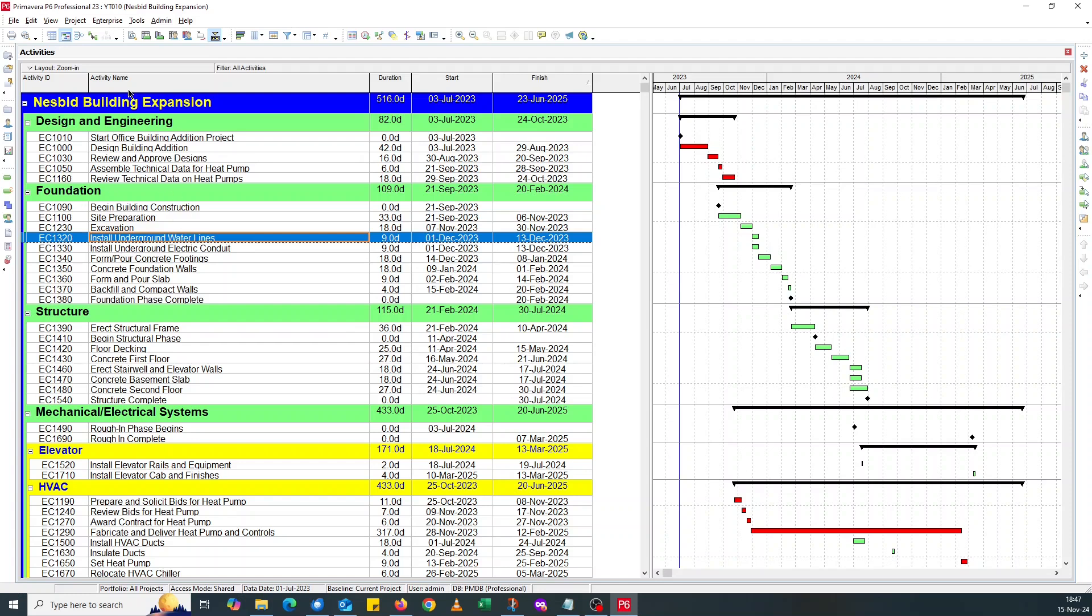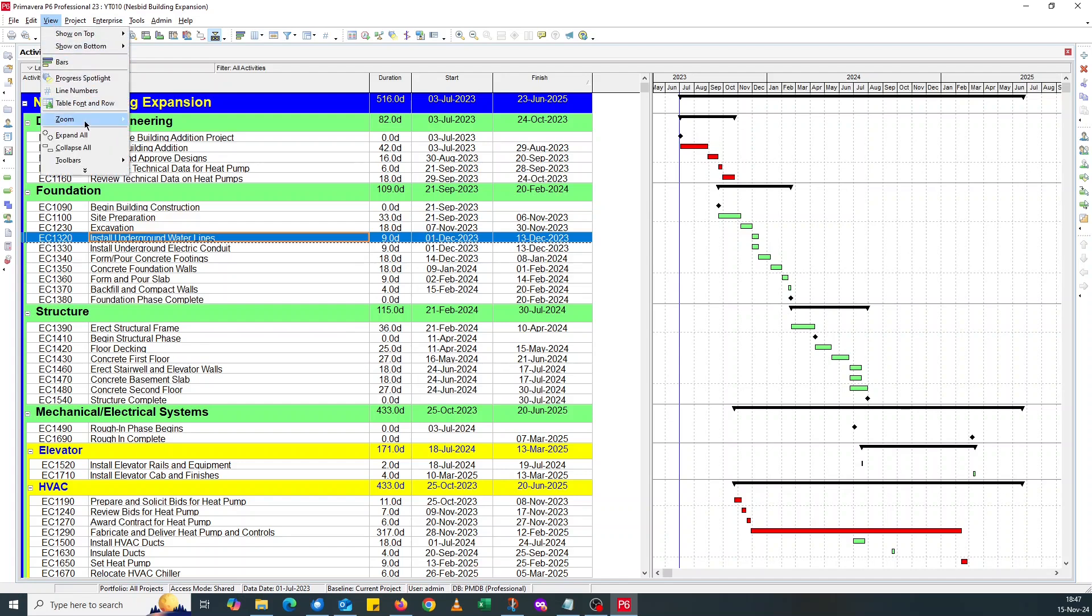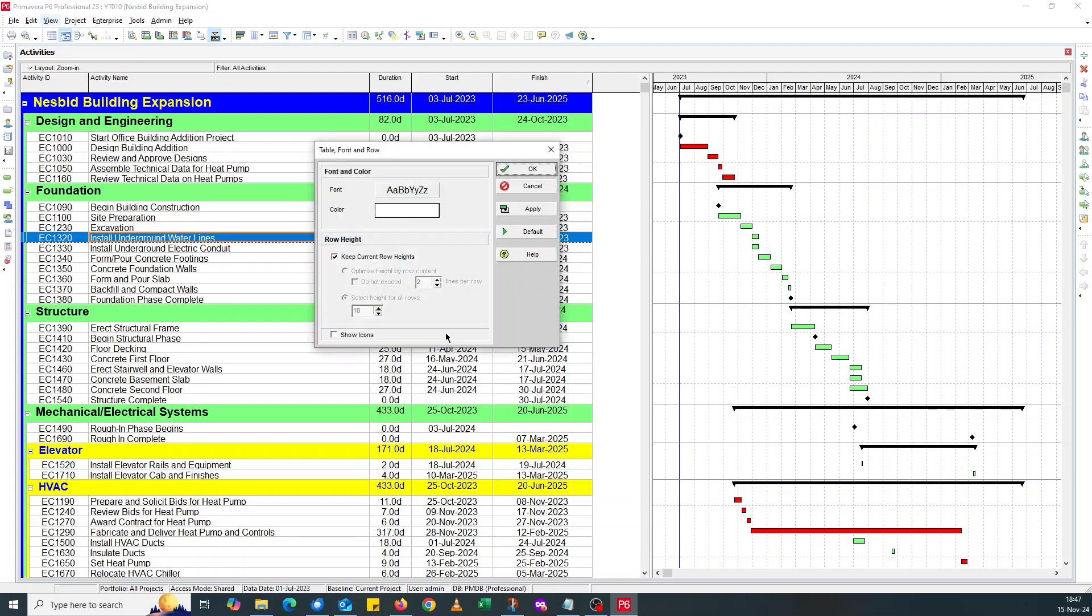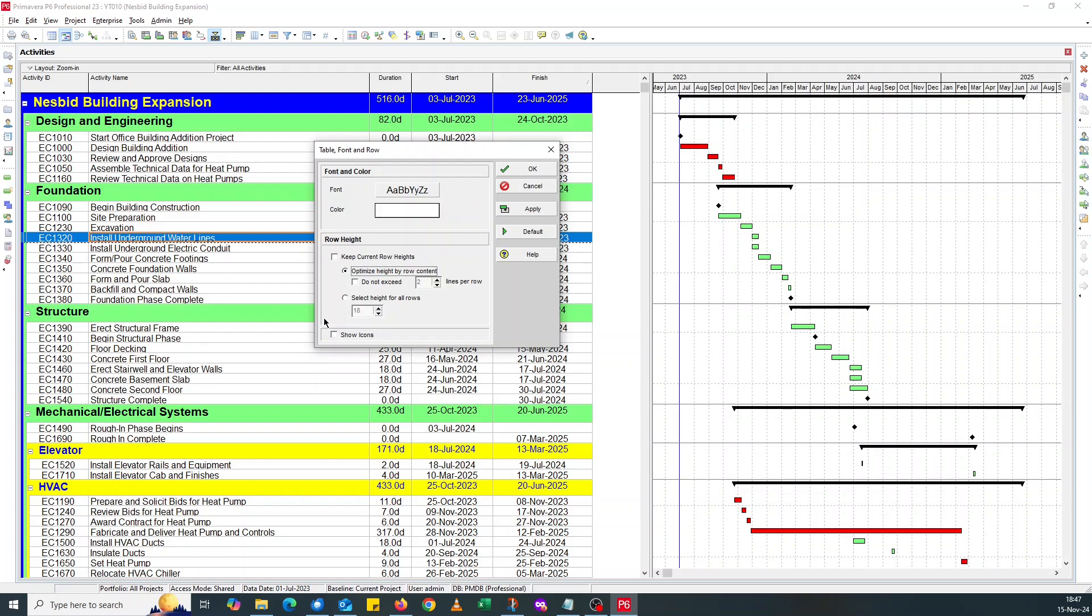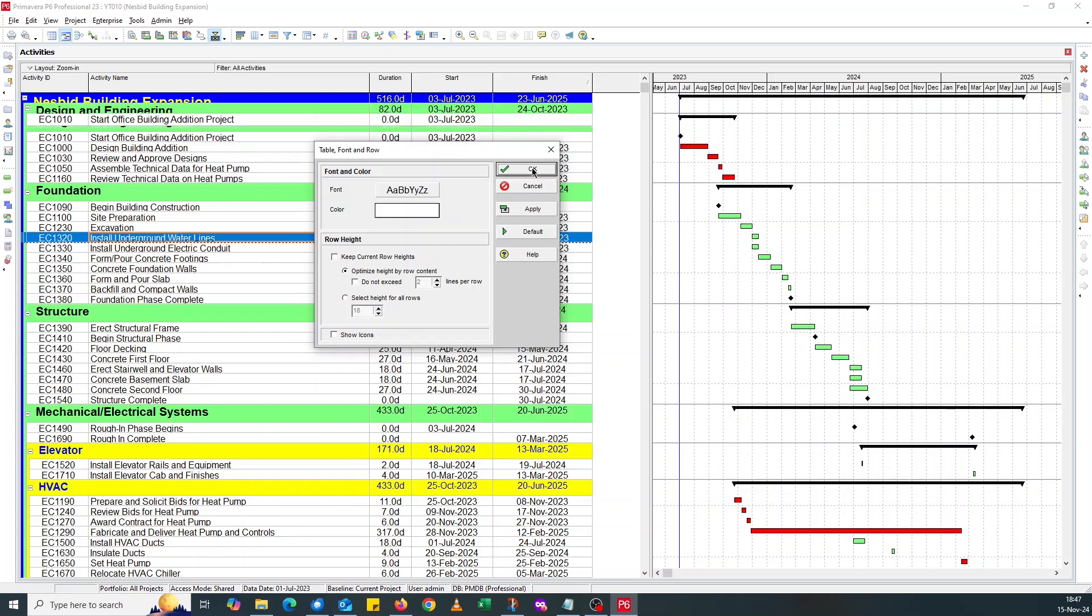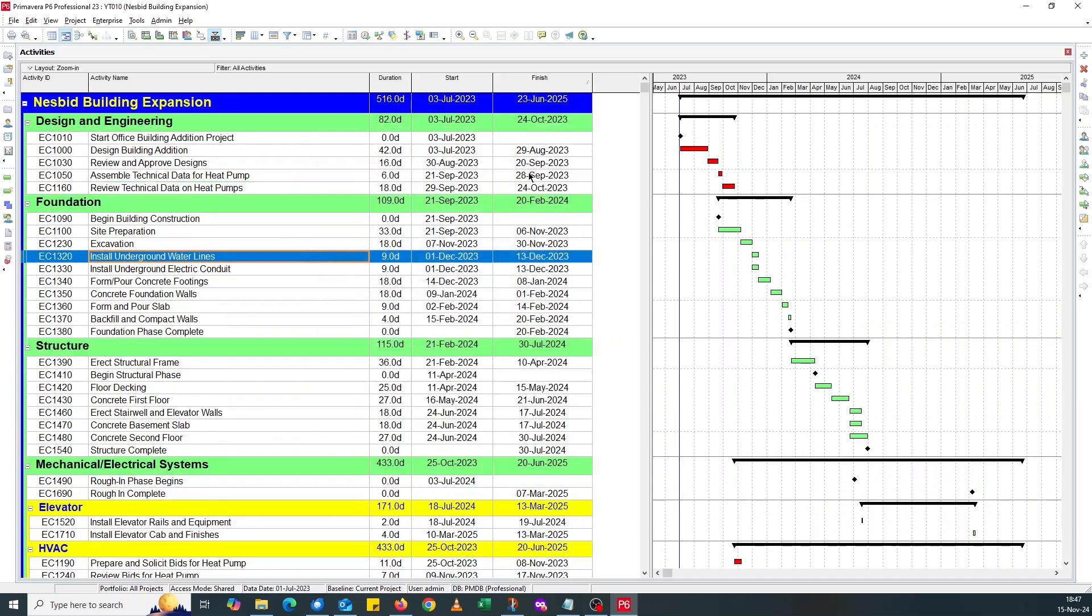Since they are bigger, the font sizes look bigger than the row size. You go back to Table, Font, and Row. Under Row Height, you uncheck Keep Constant Row Height. Click Optimize Height By All Content. Click OK. Yep, it adjusts. The sizes of the rows are now adjusted.